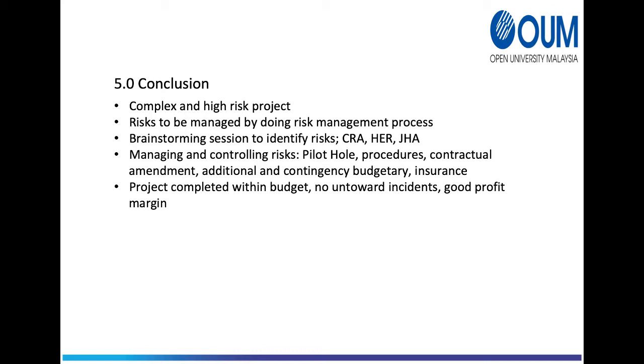A brainstorming session was conducted between project management team, asset team, expert discipline and service providers to evaluate all potential associated risks. There were 14 risks identified and registered in the risk assessment, including from mobilization, project execution, and demobilization of project. Findings from the assessment showed that drilling activities will pose very high likelihood risk to people, asset and reputation due to the presence of potential shallow gas at the proposed location.